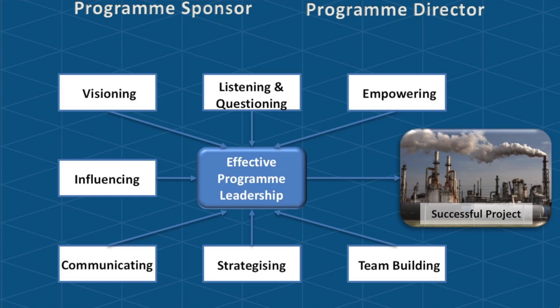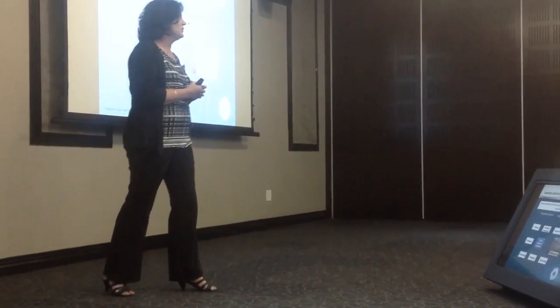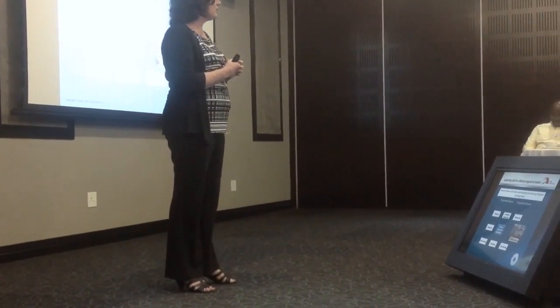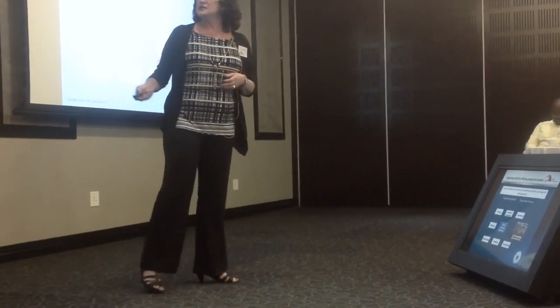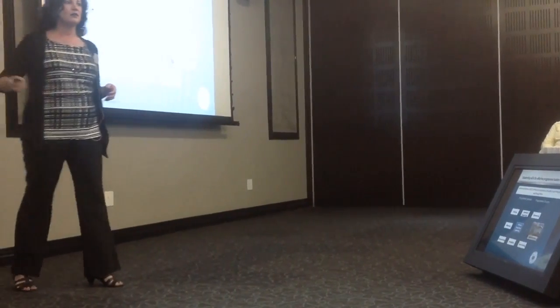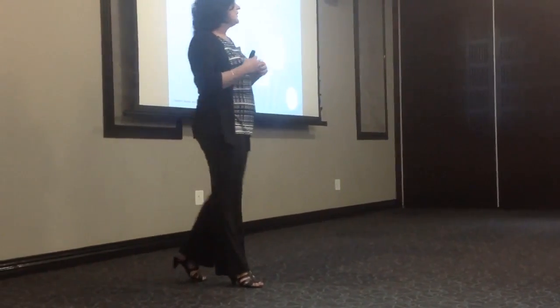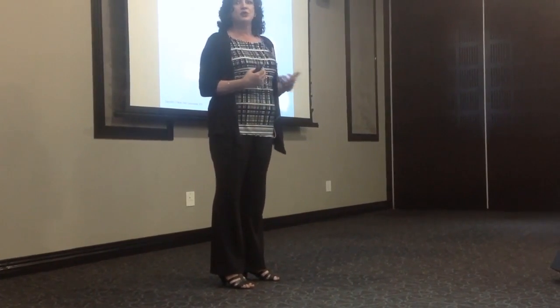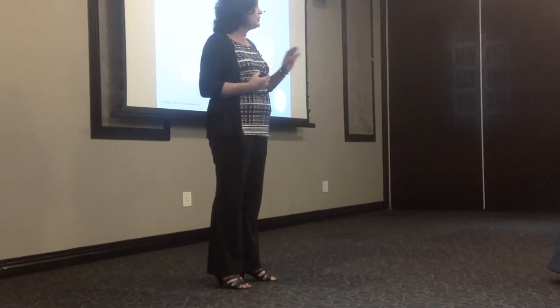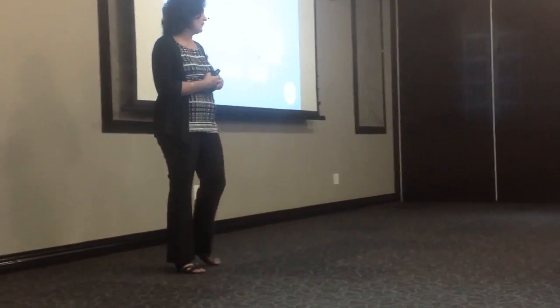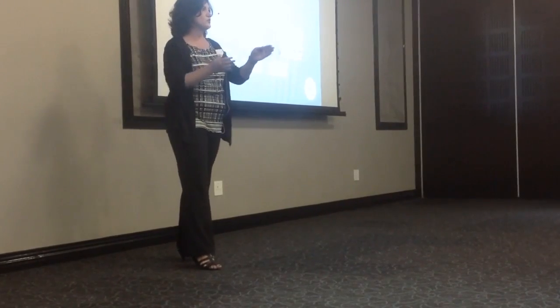So you're busy, let's say, implementing a program to improve the effectiveness of your total business. Okay? Somewhere in the middle, legislation pops up and whoops, it impacts your scope and your objectives directly. So what do you do? I mean, you can't just ignore it. You've got to take cognizance of it and do something about it. So it's very important at that stage to continuously engage with your stakeholders, know what's going on, know what's affecting your program, and communicate continuously. So if something changes, communicate to your people and tell them what has changed and what's going on, right, so that everybody can stay on the same course.